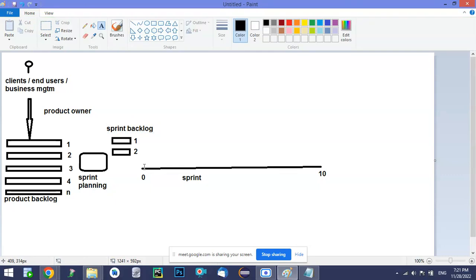And now every day we start the work. Day one, we first conduct a meeting and decide what to develop in this sprint. Once we have decided, we have to implement it. So we start to design, develop and test these requirements 1 and 2 parallelly. Everyone will be involved in parallel. For example, the tester will do their work, the developer will do theirs, and the designer also, parallelly in these 10 days. And each day, first day, second day, there will be one meeting conducted, which we call the daily sprint meeting.